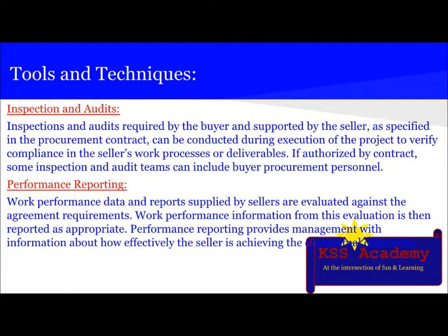Next technique is performance reporting. WPD and reports supplied by the seller are evaluated against the agreement requirements. WPI from this information evaluation is then reported as appropriate. Performance reporting provides management with information about how effectively the seller is achieving the contractual objectives.